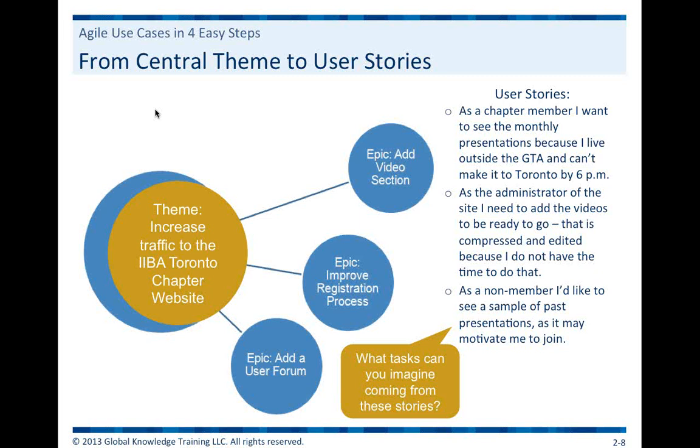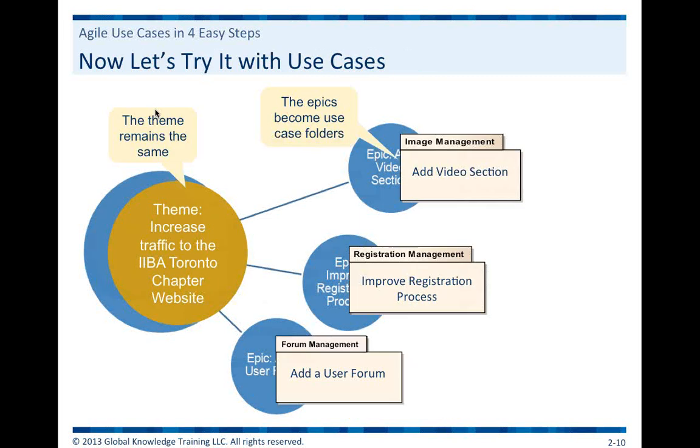And then what's cool is we can actually start to create use cases out of these user stories. From those user stories, let me go back a second. As a chapter member, I want to see monthly presentations. So I can simply create a use case that reads, view monthly presentations. And then I can actually create a use case brief from that.